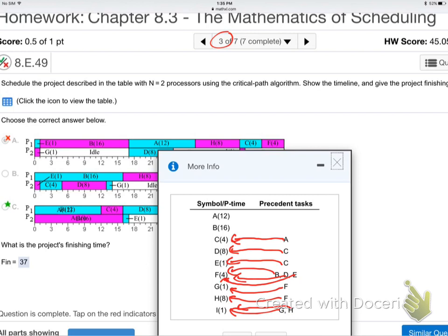Okay, here's my start. I'm going to make an arrow diagram up here. Been a while since we've done this. It was last week. Which letters can I go to from the start? A and B. Good. How do you know? No precedent tasks. Exactly. There's nothing that must be done before A, and there's nothing that must be done before B. So if there's nothing before them, they are first. That makes sense? So A and B come first, the tasks that have nothing before them.